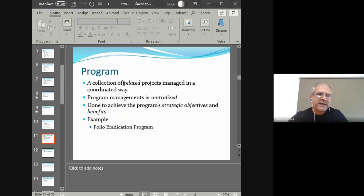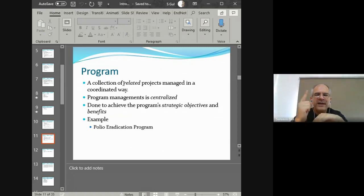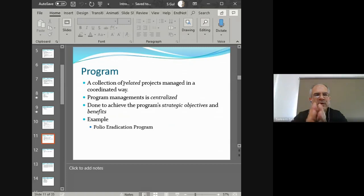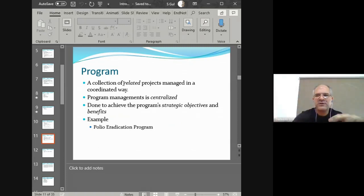We also encounter the idea of a program. A program is a collection of related projects managed in a coordinated way. All the projects within a program are related to each other — they all have to do with achieving some sort of goal. We have programs because we have a big goal to achieve and achieving it through a single project is not ideal. So instead, we break it into smaller goals and assign projects to each objective. Each project comes up with its own outcome, and those outcomes combine to formulate a program.